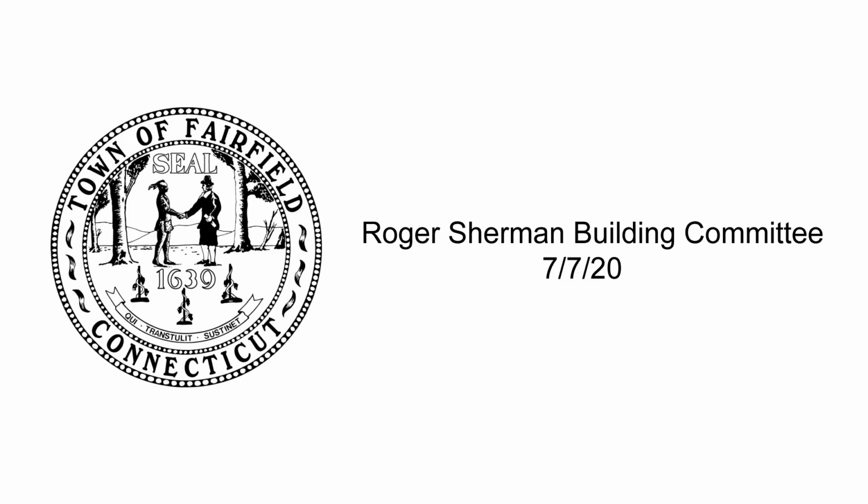All right. So, all told, adding up these 4 proposals for the base, the tile, miscellaneous tile patch, paint, and the wood shelf above the kindergarten lockers, assuming we take the add-alt on the paint, comes out to about $17,303.90. I guess my first concern would just be confirming that we have room in our budget to accommodate this, and that we have available contingency in order to do this work.